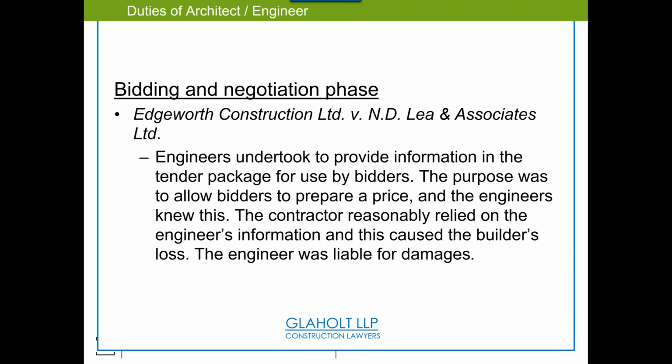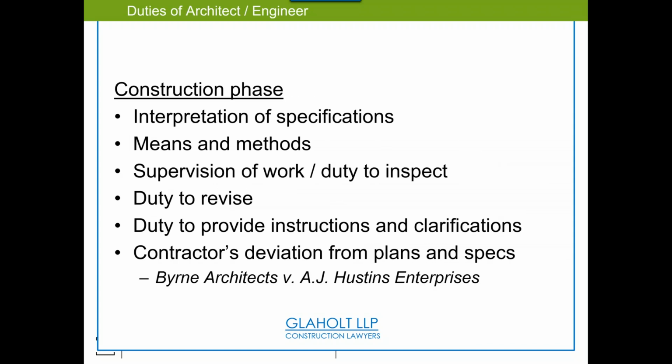And I hope I'm making sense, but I'm trying to be very specific here. Twist it around. If I give you the model and say you can query my concrete and it will be right, you're not going to come back to me and say, oh my God, I checked your length of steel and your steel was wrong. I didn't say that. I said concrete. And you check your concrete and you tell me it was right, awesome. But what are the chances of that? So engineers are very specific and very careful. But understand, as BIM coordinators, it gets blown way out of proportion. And then all of a sudden, I'm not giving you the model because I'm going to be liable for anything that's in it. And that's not true. So there's a difference there: you're liable for what you've promised or said you would turn over.